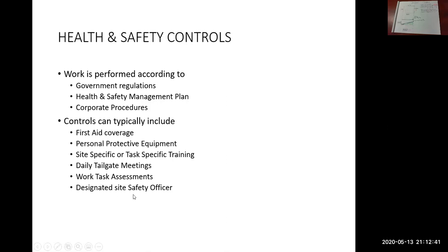Task assessments. All this stuff is safety related. All of it takes time. All of it needs to be done by somebody, whether it's the safety officer, as shown here, or the supervisor running tailgate meetings. All that stuff, your employees are getting paid while they're going through a tailgate meeting. So maybe it's the first half an hour of each day.